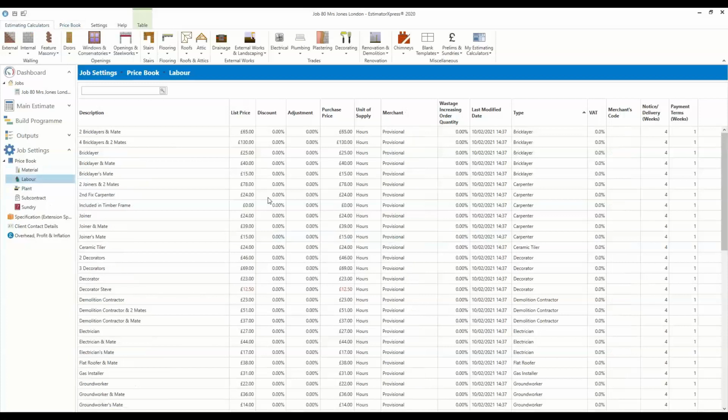Labour rates are again a reflection of the industry, the overall average for brickies. We've got them in at around £25 an hour for the brickie, which is equivalent to about £200 a day. I'm speaking to a lot of builders who might be spending maybe about 180, maybe up in the northeast about 160. So if you want to adjust that, 160 divided by 8 is about £20 an hour.